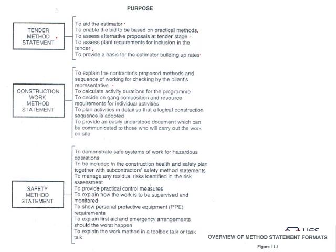The method statement calculates the duration of the program, assists in assigning resources and gang sizes, and plans activities in detail so logical construction sequences are adopted. It also provides an easily understood document that can be communicated to those carrying out the work — for instance, during a toolbox talk, you can give the method statement to your foreman and explain it to the team on site.